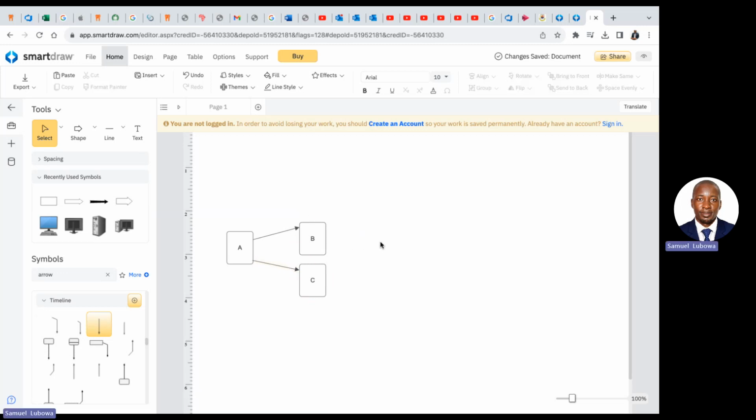I have a paper where I'm basing, as a reference to the other network diagram that we have been drawing together. So remember, since we already have activity A, B and C, we go to activity D, where we know that for activity D to start, B must first finish.